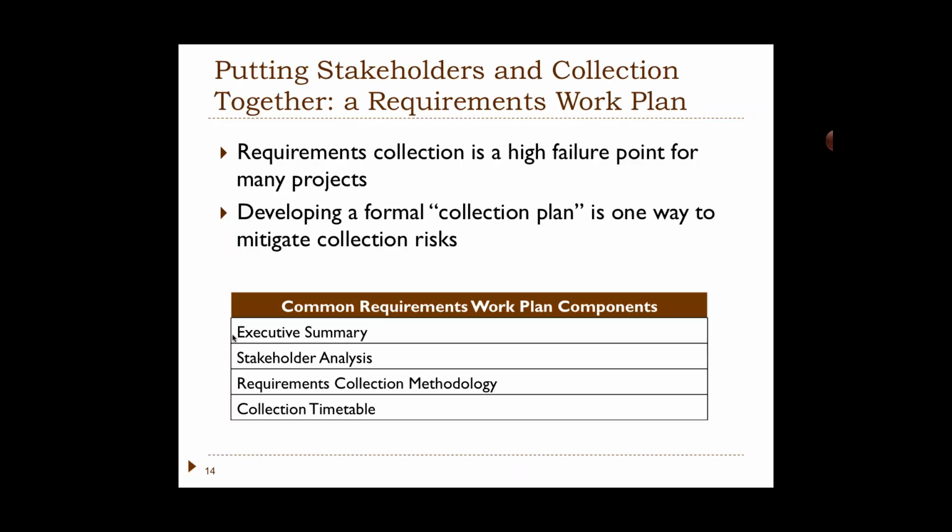The project charter comes the other way. The project charter is written, if not by the executive, then for their signature as if it were coming from them. So as a project manager, you might be delegated the responsibility of preparing a project charter that says, here's what we hope to do, here's what we want to have happen, and it's basically a very high-level description of the project. And in addition to describing the project, it names the project manager. So it's, all right, Kathy, here's what we want you to do, and you're the project manager, go forth and conquer.